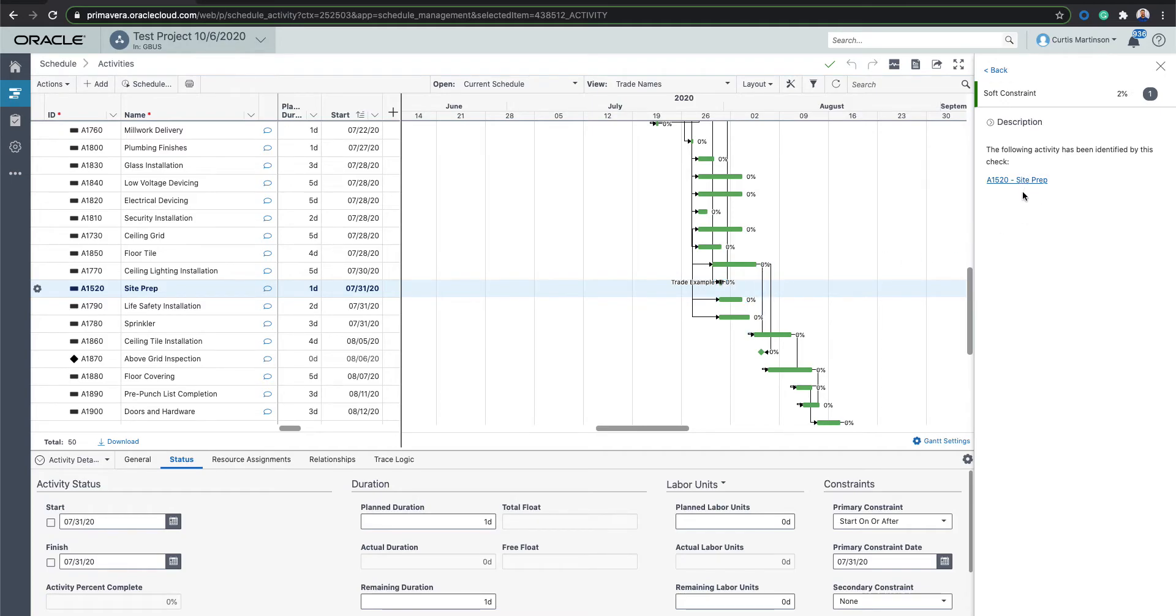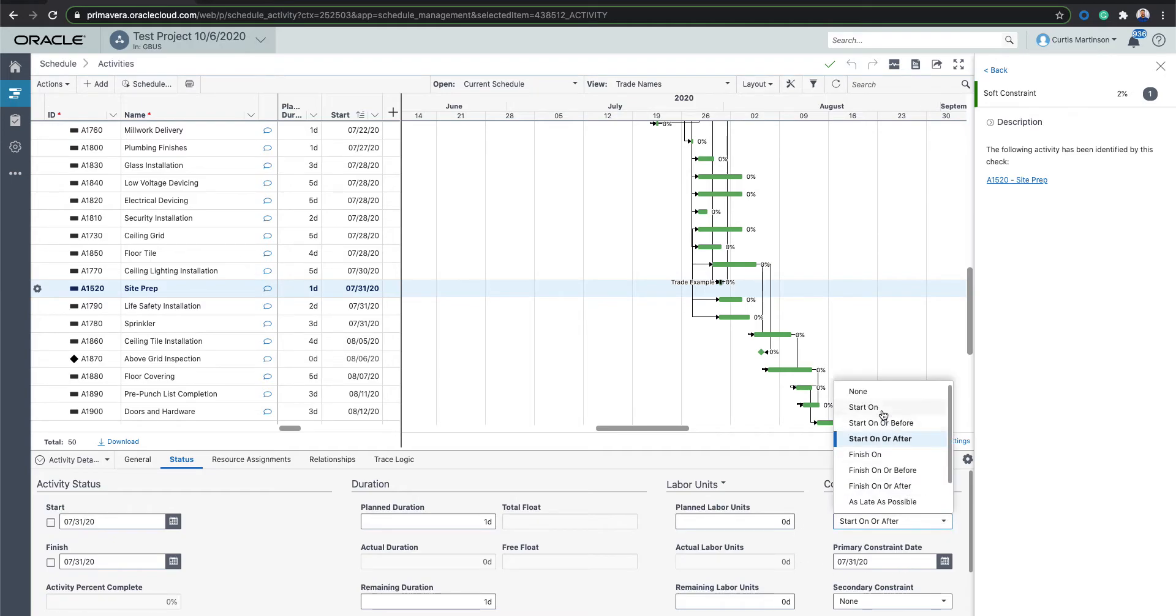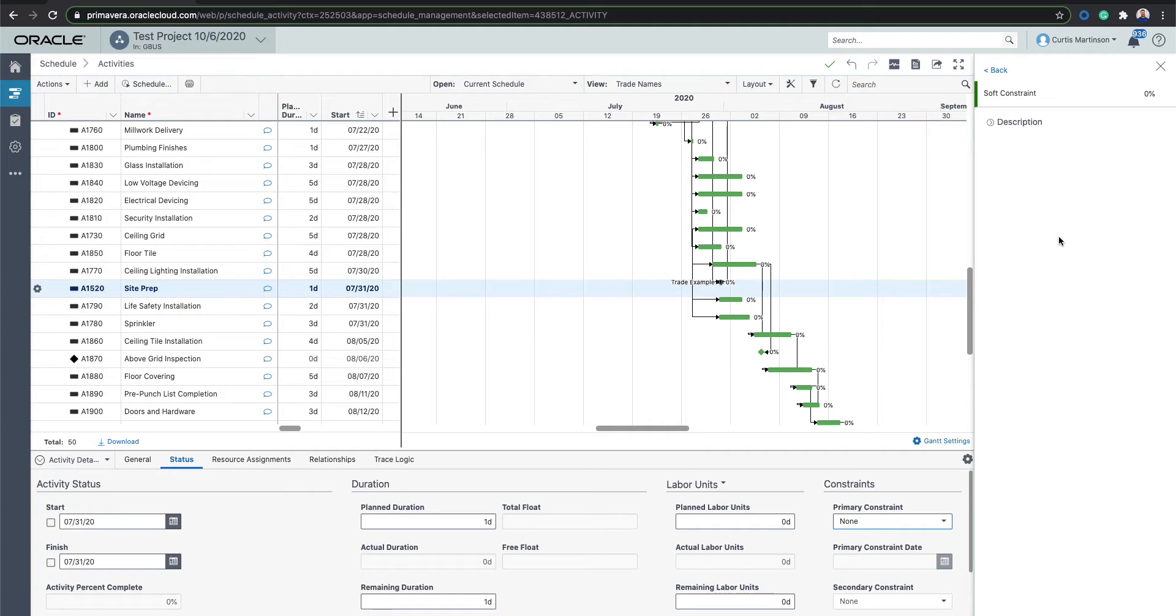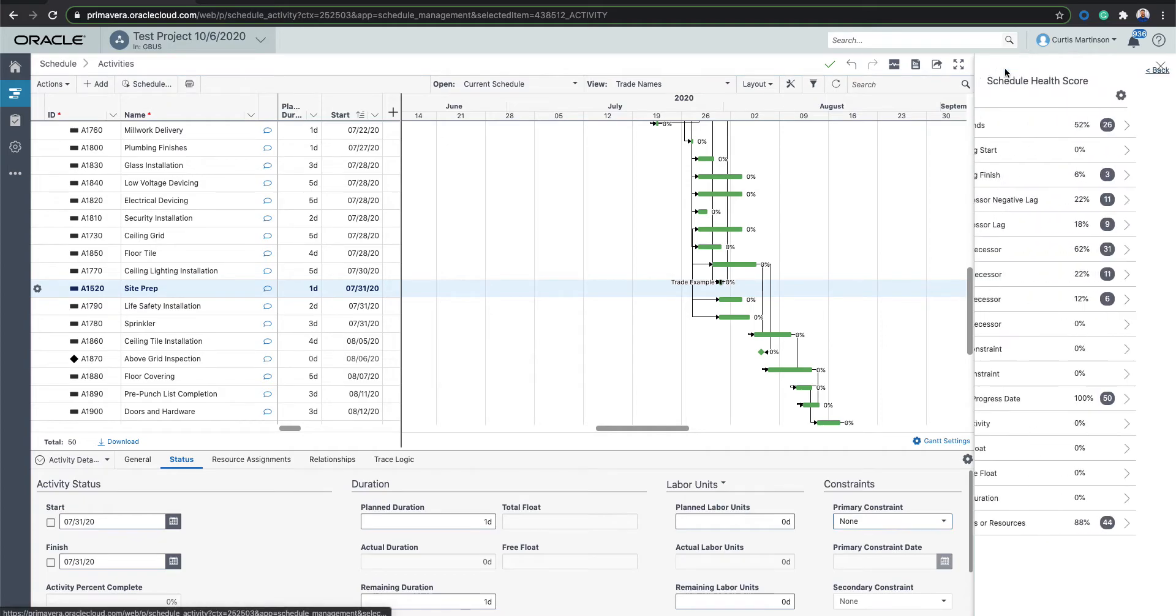So if you have multiple constraints, it would list all the constraints here. If you click on the hyperlink, it'll bring you to the item. And then on here, you'll notice that this one has a constraint applied to it. If I turn that constraint off, this list will refresh and that item will be gone.